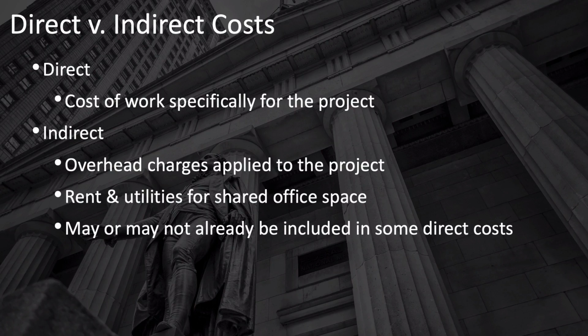If you're a team of 10 people and you've got an office with 200 people in it, then 5% of that office's cost could be applied to your project.